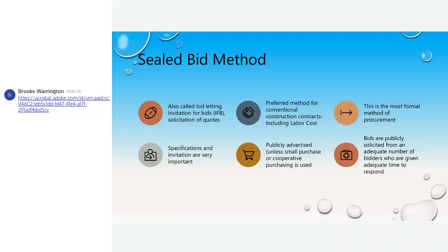If the bid opening is at 3:00, they'll come in at 2:56. They'll be with a pencil getting up-to-date prices right until that point. And if you don't give them adequate time, they won't give you the time of day. They can't take that risk because they have to do it for whatever price they submit. You really got to be careful with this method. You give them adequate time.